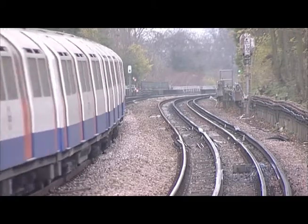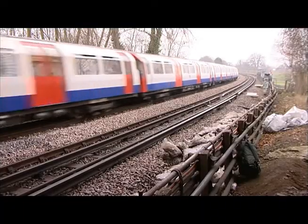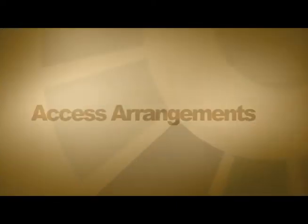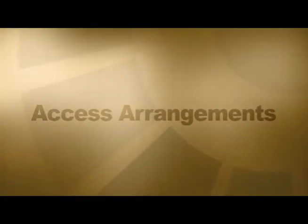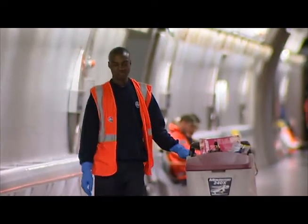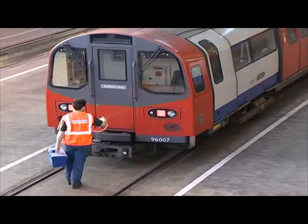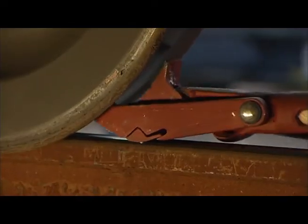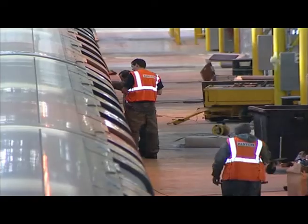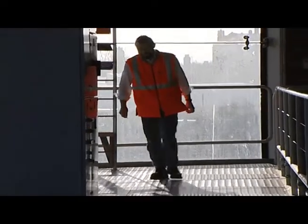A contact list of those responsible for managing the plan for operational and transitional arrangements to introduce the 7th car will be made available to all who need it. To achieve all the necessary works, many contractor teams will be engaged on the conversion works during the line closure. Operational staff will, therefore, need to support the contractor teams and provide them with assistance, as required, to help ensure the timely introduction of the 7th car. Every contractor team will have a nominated Tube Line's delivery engineer with them. This person will be the station supervisor's point of contact.